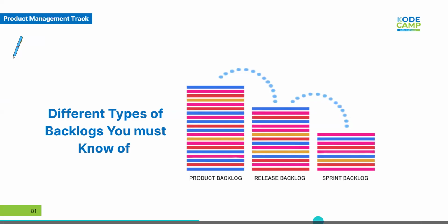backlog. Let's say you're in sprint 12 and you've got a 2 weeks window. You hold a sprint planning, you look at what you have that is ready, you review your team's capacity, and you select 6 to 8 stories that can fit into the sprint. Now that becomes the sprint backlog.